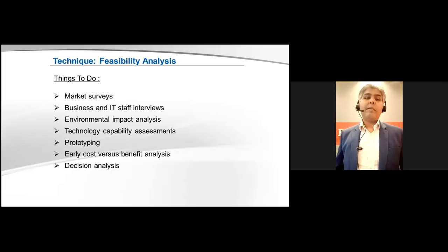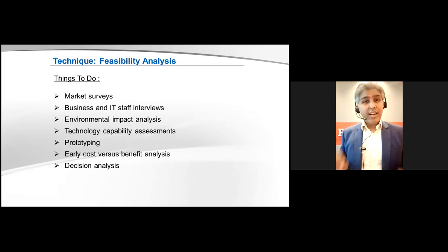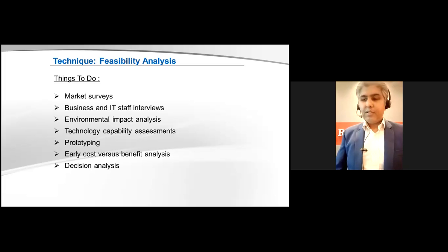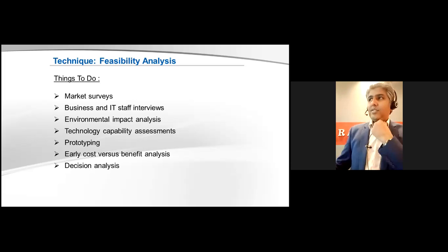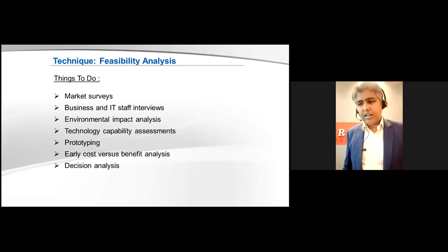There is something called pre-feasibility study, which is maximum 3 months. They analyze very specific indicators to find out whether a feasibility study should be done on those projects or not. So we call it pre-feasibility study, which gives the go ahead for the feasibility study, and then the feasibility study follows. A feasibility study is nothing but market surveys.